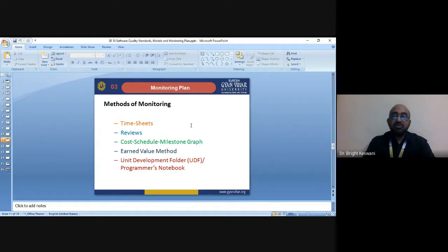First, the review schedules can be used to determine how the project is progressing compared to its planned schedule, and then the review report indicates in which part of the project the programmer or analyst is having difficulty, and with this information corrective actions can be taken by the management, like replacing a junior person with a senior person. So review is a method that provides a wealth of information to the management and the project leaders, related to the performance of the code or the performance of the staff.